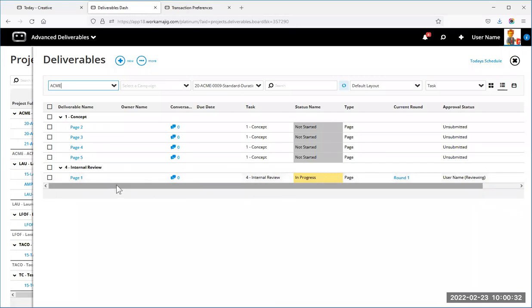But as long as it's for a task, you can enter time directly through the deliverable in that respect. But just keep in mind, you're breaking the assignment portion of the system with the Today creatives. So use some care about that. That's where you create those more detailed schedules. If you don't necessarily care about matching everything per task, per person and all that, then this is a great way to do it. It keeps it simple. It just adds time to your default service right onto a deliverable, and off you go.